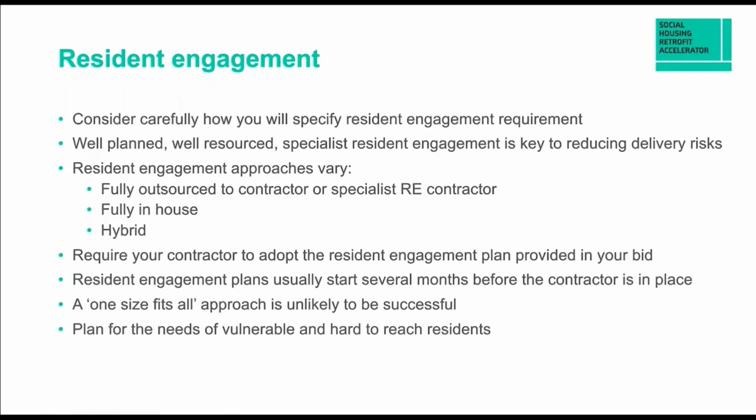So these are some of the approaches you might well take. Fully outsourced to a contractor or specialist, a resident engagement contractor. Fully in-house if you have that resource in-house with a resident liaison officer and a team, or a hybrid of the two. You might be able to use some of the in-house capacity, and because you're doing an additional campaign around retrofit, there needs to be additional resource brought in.